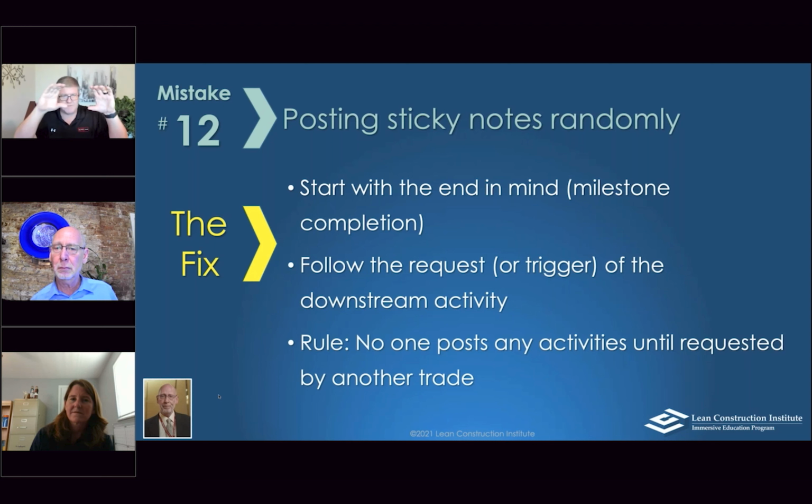So at my top row of sticky notes, it would be concrete footings, concrete footings, concrete footings. Then we may continue, but I would drop those sticky notes down to show, like in week 4, steel starting. Then it's steel, steel, steel, steel, steel for 5, 6, 8 weeks, 10 weeks, whatever it is. And then at some point, there's elements that jump in there, and it's either pouring slab on metal decks, or at the end, then we've got roofing and cladding and things that are part of or attaching to the steel.